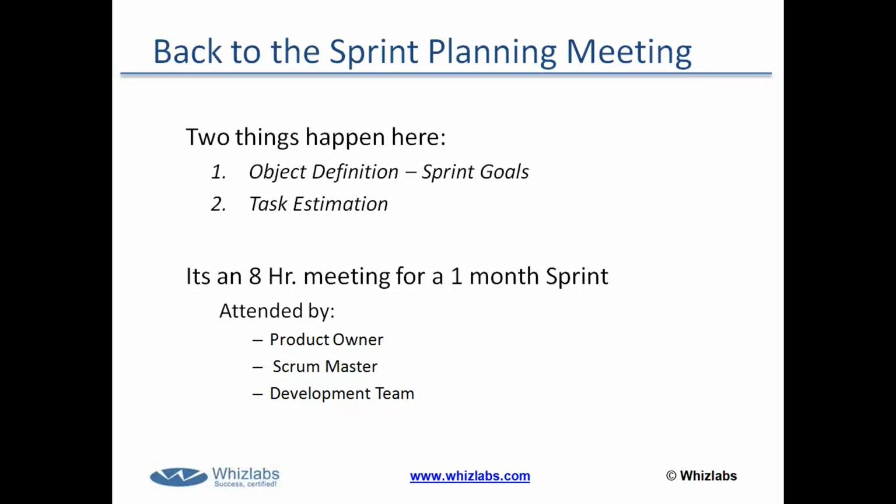We talked about that last time, that when the developers meet with the stakeholders and the product owner during the sprint review meeting, which is the meeting held at the end of the sprint, the product owner has the capacity to tell the developers, no, you know what, this feature does not meet the acceptance criteria, so therefore it is rejected, go back to development and bring it up on the next sprint, right? So here during this sprint planning meeting, the acceptance criteria is clarified.